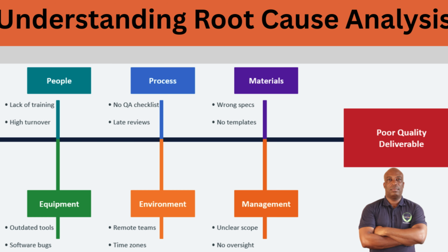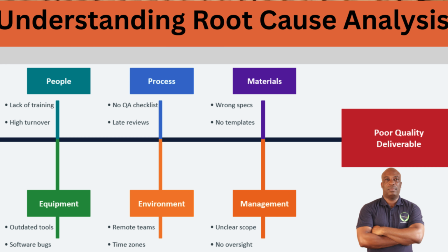Number two, you also want to prevent that issue or that challenge from coming again in the current project, or even future projects. So there are so many items which you can use for root cause analysis. And one of them is what is called the Ishikawa diagram, or in general, the RCA, root cause analysis diagram, where you look at possible categories that can cause the problem. And then to the right, you have your issues. Let me show you.